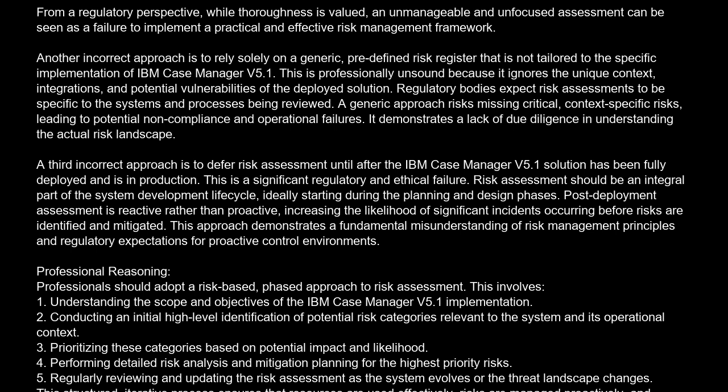Professionals should adopt a risk-based, phased approach to risk assessment. This involves: 1. Understanding the scope and objectives of the IBM Case Manager v5.1 implementation. 2. Conducting an initial high-level identification of potential risk categories relevant to the system and its operational context. 3. Prioritizing these categories based on potential impact and likelihood.